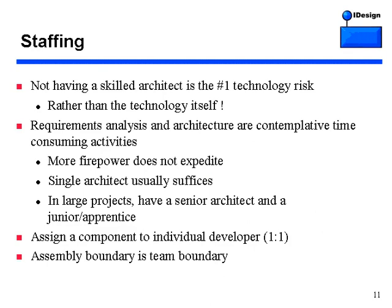I firmly believe that not having a skilled architect is the number one technology risk in any project — usually much larger than the technology risk itself. When staffing a .NET project, the most important thing is getting a skilled .NET architect, someone with experience in decoupling the system and decomposing it into components that are just right. You might ask: should we get two or three architects? It turns out architecture is a task that more firepower doesn't expedite. You very quickly run into the nine women, one month, baby problem.